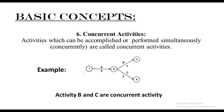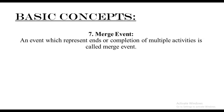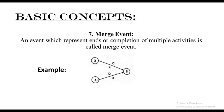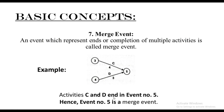That was concept number six. Next we have the merger event. An event which represents the end or completion of multiple activities is called the merger event. Merger is when you're merging two or more activities to one single end event. For example, we have activity C and activity D — two different activities — and their arrows have been merged to one single event, meaning that is the completion of both. Activity C and activity D end in event number five, hence event number five is the merge event.